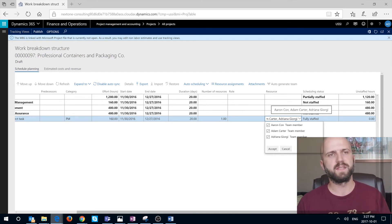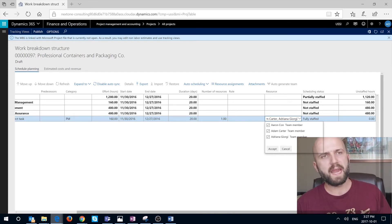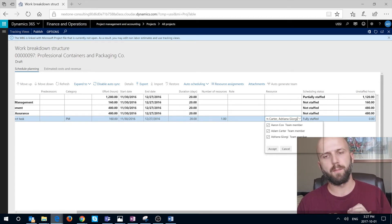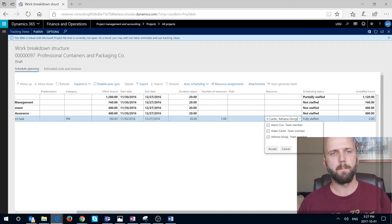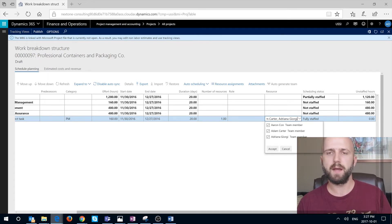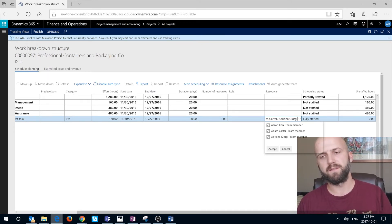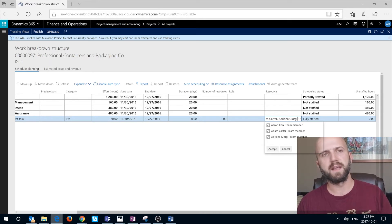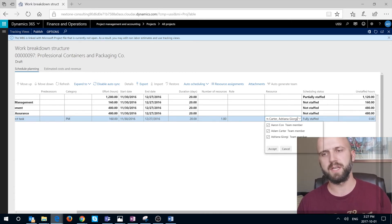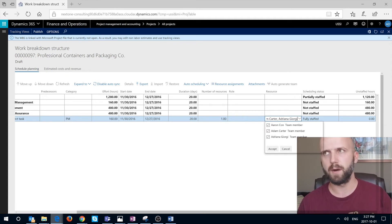This was the way we were able to publish into WBS for our project in Dynamics 365 by modifying the file in Microsoft Project client, saving the file, and then closing. And then on the prompt saying yes, we would like to publish those changes into our project in Dynamics 365.